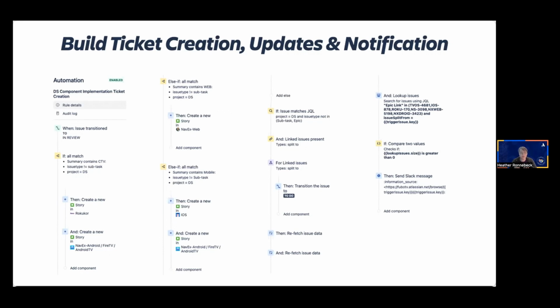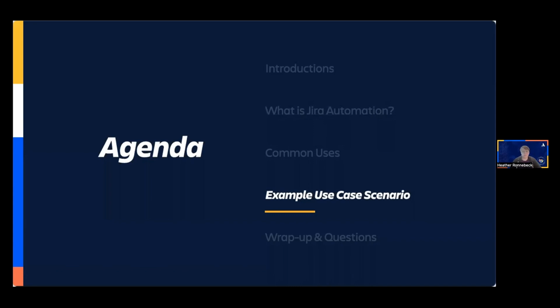And I found that the second refresh just helped buy a little bit extra time in this specific automation rule in order to prep it so that the JQL lookup issue action would actually execute properly and was able to successfully pull all of the tickets that were created so that it would send out the Slack message. I will also point out I used it too because it was the best knowledge I had at that time for how to do that function.